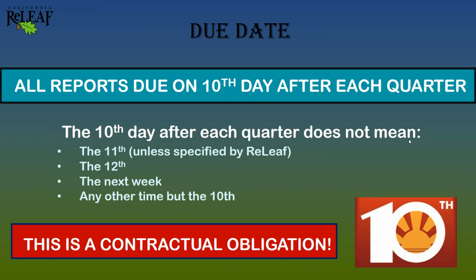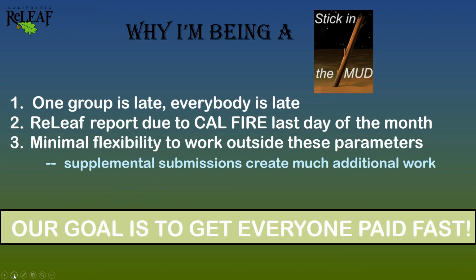And you'll see that I'm really stressing the 10th for a variety of reasons. The biggest being that this one has been a little tougher for a lot of groups to adhere to. And I wanted to just provide a little context of why we do really stress getting the reports in on time on the 10th. And it's that we want to get you paid. The challenge by having reports coming in late is that we are not in a position to submit our reports to CAL FIRE as they come in. We have to submit all reports to CAL FIRE by the last day of the month in order for us to be able to take that piece of the reporting off our docket and then move forward in providing payments to groups.